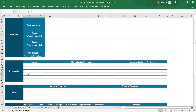If you're preparing for the PMP exam, you'll encounter scenarios like a sub-consultant declining at the end of the project and demanding more money. Since the sub-consultant is a major stakeholder, the project manager should understand their concerns, discuss the financial impact, and agree on a resolution. This is why we should always consider an escalation percentage in our projects.